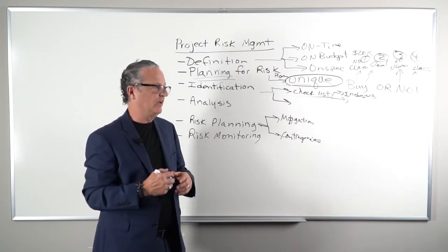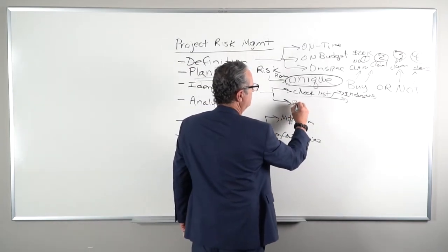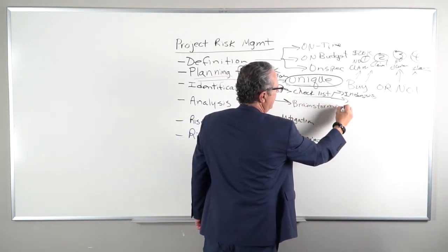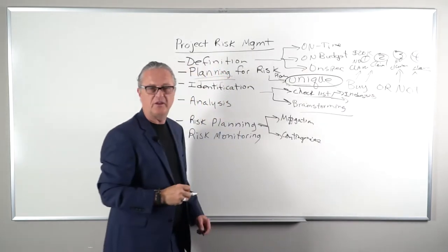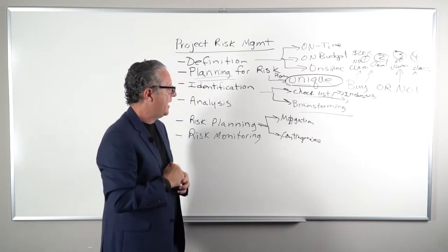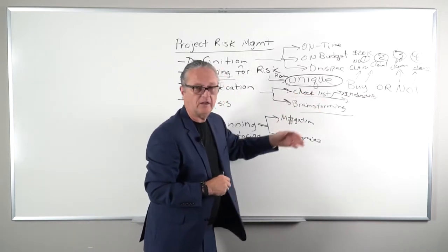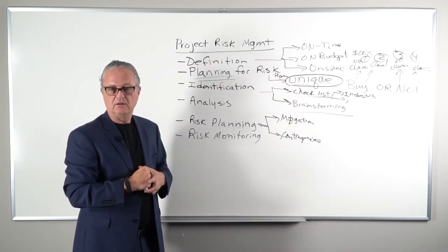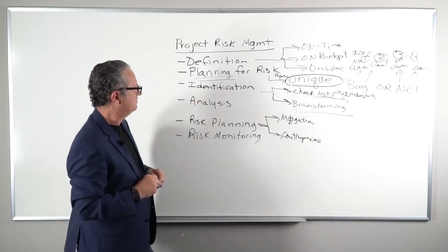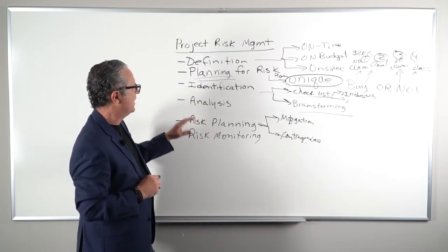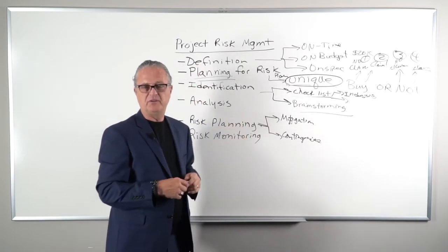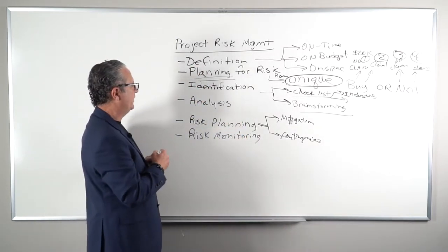So how do we collaborate? We would call that brainstorming. And how do we do brainstorming? We bring experts together, the ones that are closest to the actual build of the solution, and we augment our checklist with any specific areas in this project. I'm going to come back to this. Let's talk about analysis. Now we've got our list. We have a long list of potential things that could go wrong, and the question I ask here,